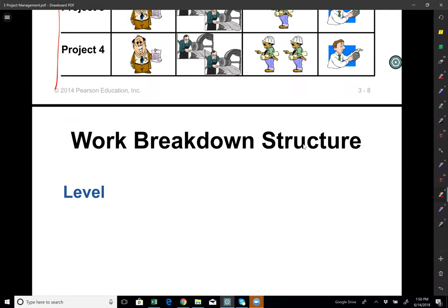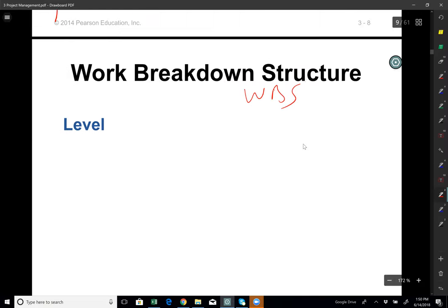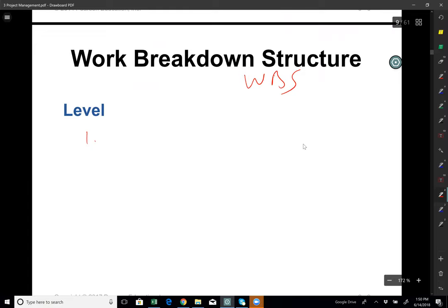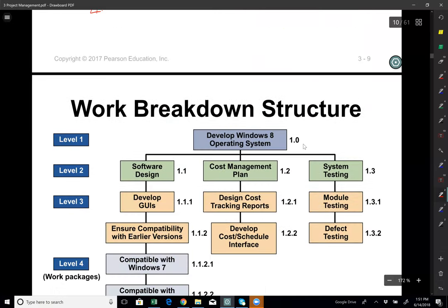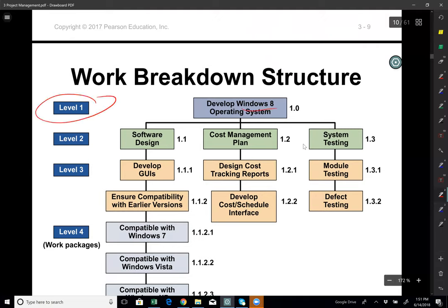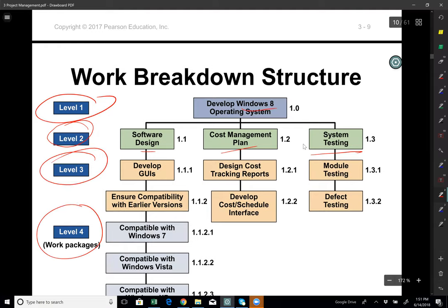One of the most important things in project management is work breakdown structure, or WBS. There are levels in WBS. Level one: define the project. Level two: define the major tasks. Level three: define subtasks within the major tasks. Level four: define activities or work packages within the subtasks. For example, the project might be to develop a Windows 8 operating system, with major tasks such as software design, cost management plan, and system testing, each broken into subtasks and work packages.